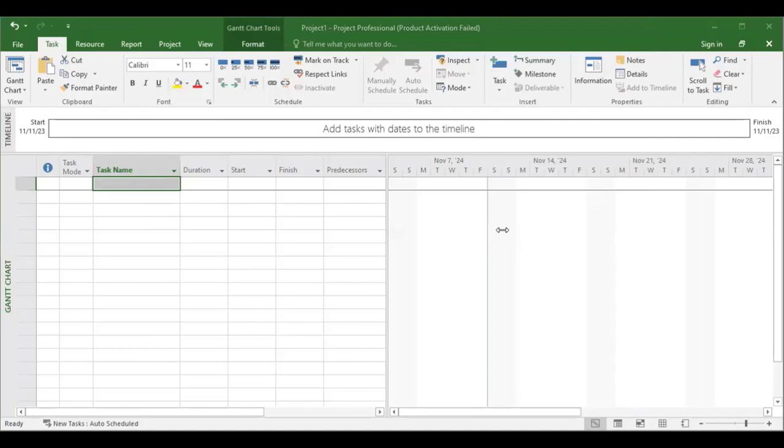Somebody is asking a question. I thought it's Sunday, the start weekday. Yes, but do we work on Sunday? That is the question. Because when you say Sunday is the start of the week, what it means is this software will schedule work on Sunday. Do we work on Sunday? The answer is no. So it's advisable you set the week to start on Saturday so that it does not schedule work for Sunday. All right. So it's important we start on Monday. Okay.